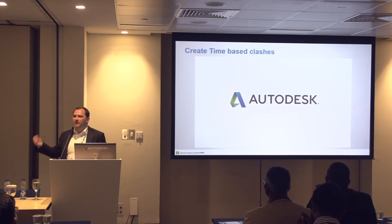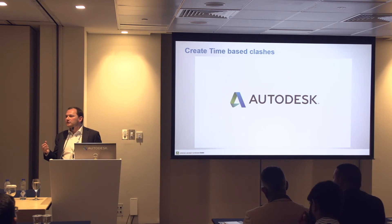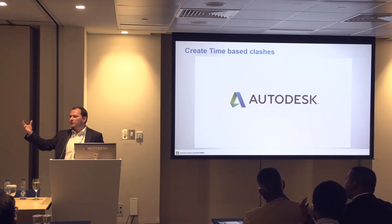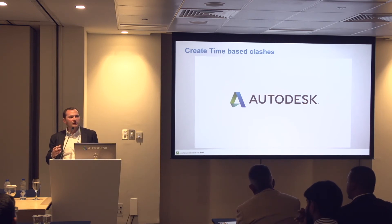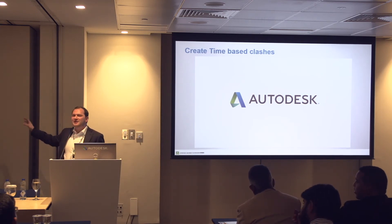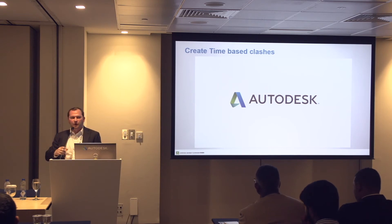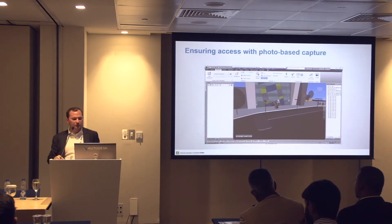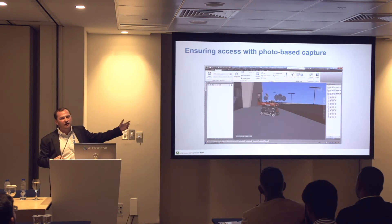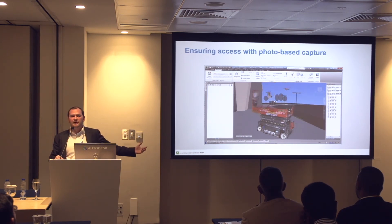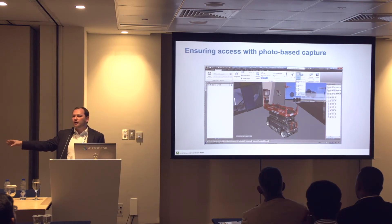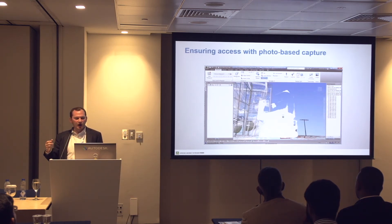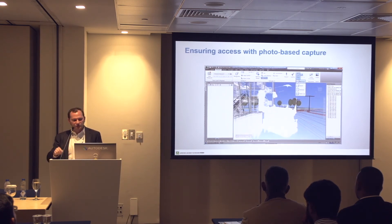We've taken this one step further with photogrammetry — taking lots of photos and creating a 3D model from them. In this example — I only took about 20 photos, but in reality you want about 40 plus — you take one or two measurements of the object, it goes into the cloud, creates a 3D model. You can then bring that back into Navisworks and do exactly the same time-based clash detection. Rather than having somebody spend the day doing modelling, they can just take a bunch of photos to create a 3D model, which then allows you to do that clash detection.